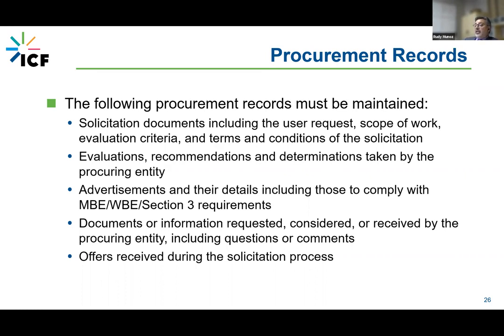any and all advertising that was used when you conducted the procurement for the goods and services. And if applicable, the advertising documentation should include language or documentation on your requirements for MBE/WBE, for Davis-Bacon and Related Acts, or DBRA, and Section 3.